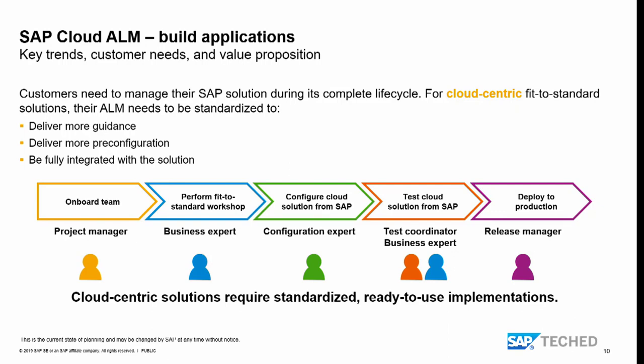Then you also do a scoping. The project manager needs to decide for which company, which business areas, which countries you want to do the implementation, and hand that then over to the business expert to conduct the fit to standard workshops to collect requirements, which are then handed over to the configuration expert, who then configures and implements that in the cloud solutions. For sure, everything needs to be tested before you want to go live. And then you might want to deploy that to production.